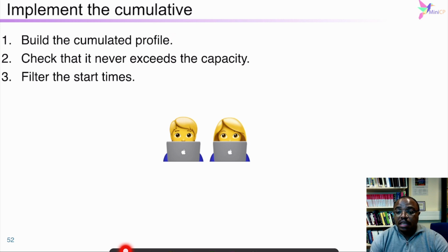We see that in this context, start times of activities are fixed. Activities are decomposed into two events, a start event and an end event. After creating events, they are sorted in increasing order of time. We can then sweep over the timeline of events and compute the height of the corresponding profile rectangle.